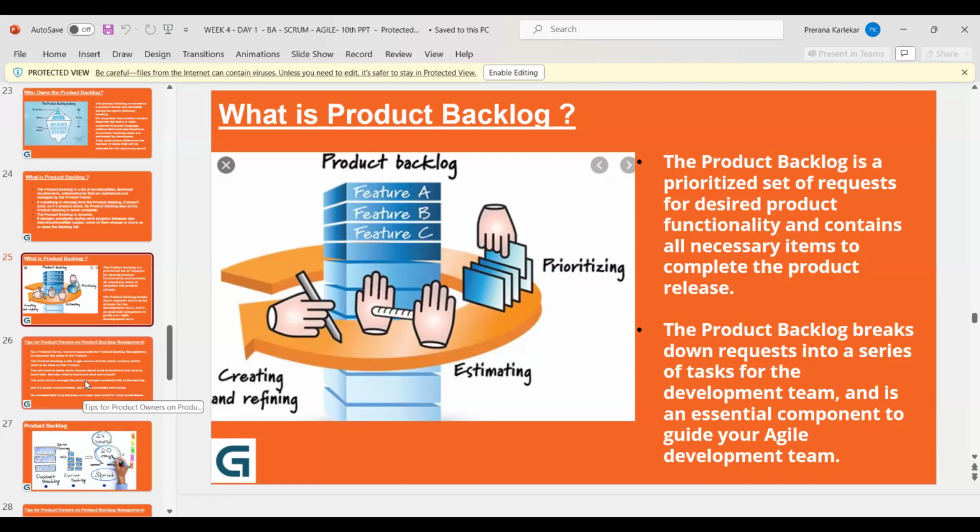And while this continues to execute, business analysts, whenever they have time, continue to pick up some features from the upcoming sprint. They work upon them and expand them, so that it will be quite easy when all the team members sit and discuss the next sprint. That is exactly what happens in backlog grooming. This is all about the product backlog and how it is taken care of.